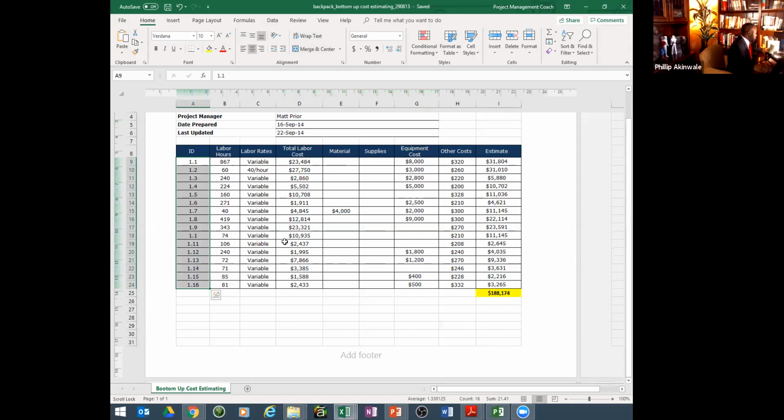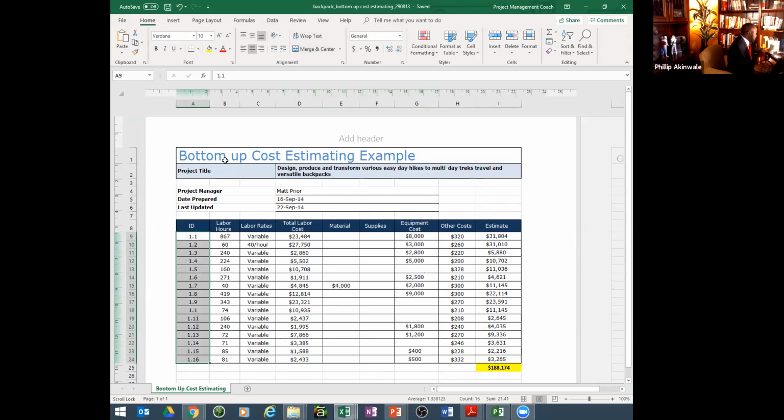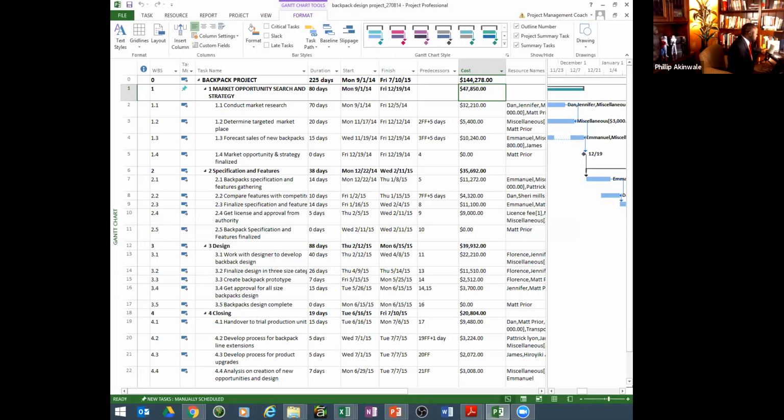Regardless, whatever they are, the bottom line is if you're doing bottom-up estimating, you can either break open a task into sub-levels, roll that up into the task, roll up all the tasks on that level into the work package. Whatever you're doing, you need to know that there's a difference between aggregating the cost into the final budget versus estimating the granular amounts for each activity, which takes me back to this schedule here, because the idea in estimate cost is to really estimate the cost for every one of these itty bitty items and then roll those up into your final number, whatever that ends up looking like.